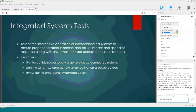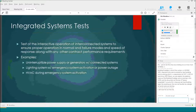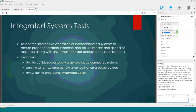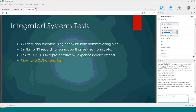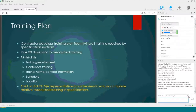Integrated systems testing — sometimes functional performance testing isn't the end. Once we test HVAC, power distribution, lighting, and fire systems, we may have to test the interactions between them. For example, if we have UPS systems and power generators, we need to test that lighting and HVAC systems respond correctly when under emergency power, since HVAC systems sometimes operate differently under emergency power. These are called integrated systems tests. It's an optional test in the specification — it's up to the specification editor to decide if those tests are necessary and to what extent. They follow the same processes as functional performance tests, including the same requirements regarding aborting tests and sampling.